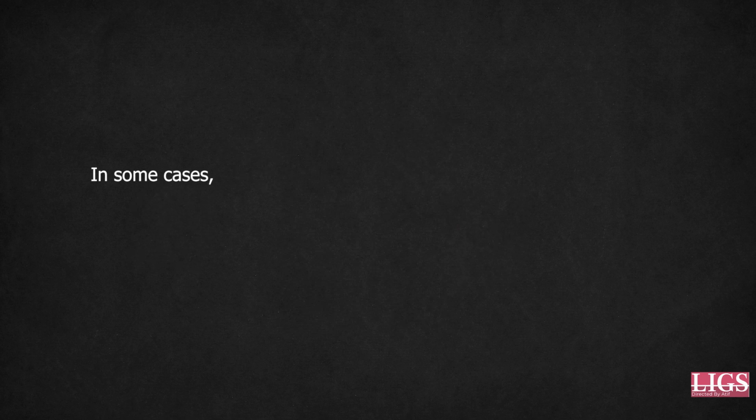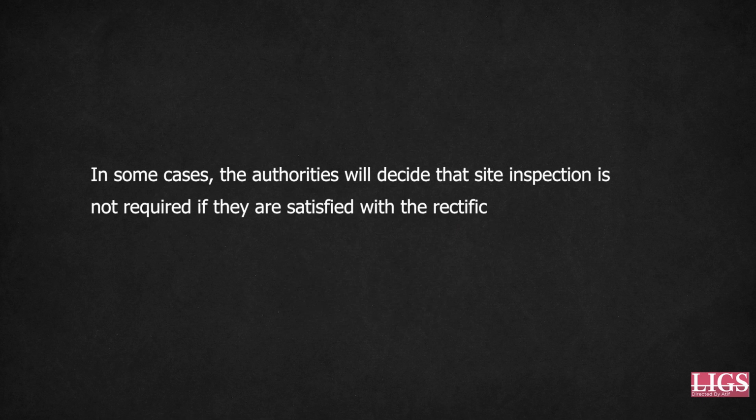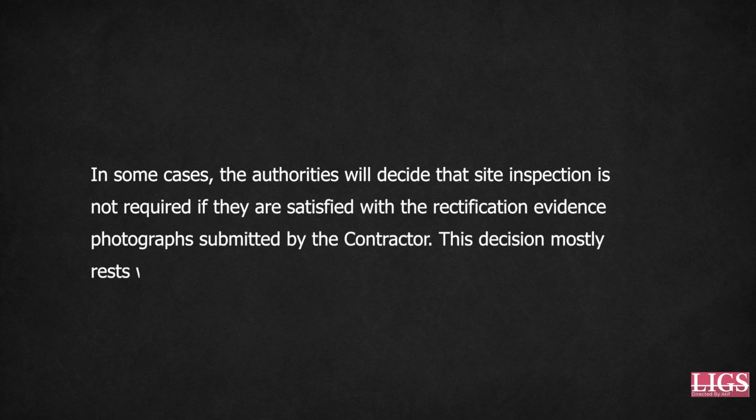In some cases, the authorities will decide that site inspection is not required if they are satisfied with the rectification evidence photographs submitted by the contractor. This decision mostly rests with the asset engineer.